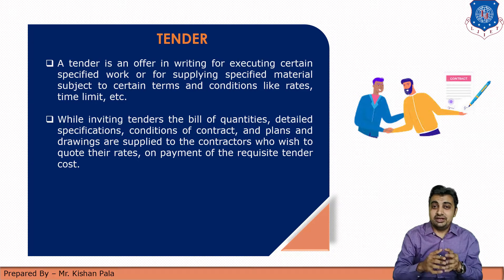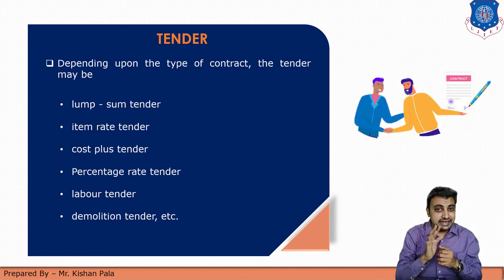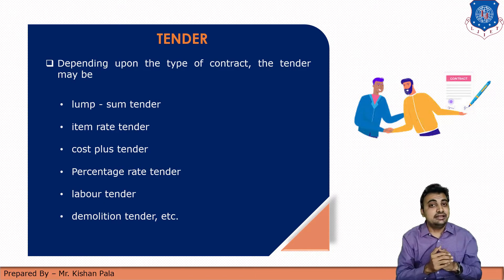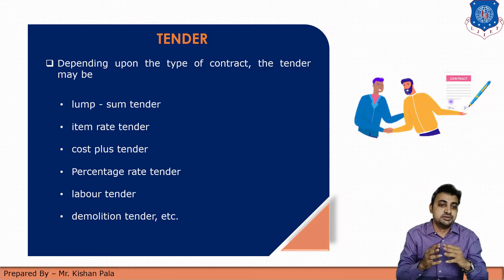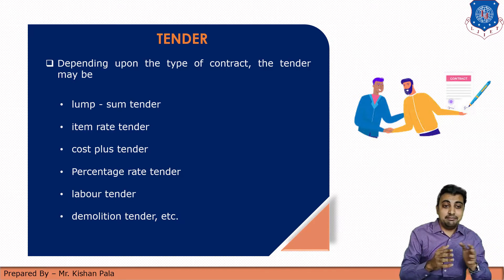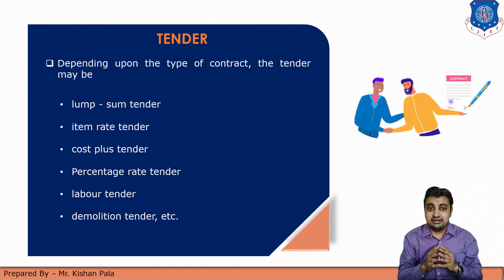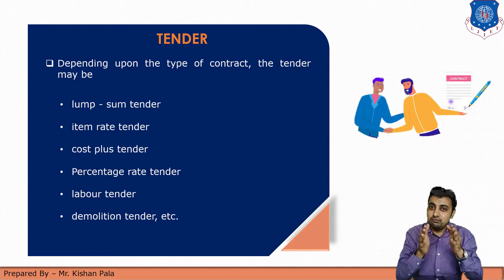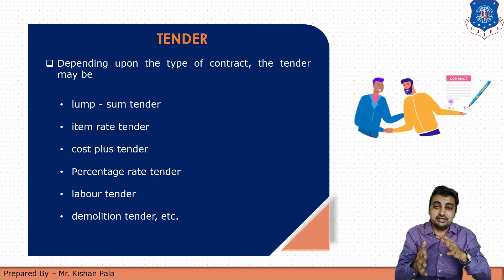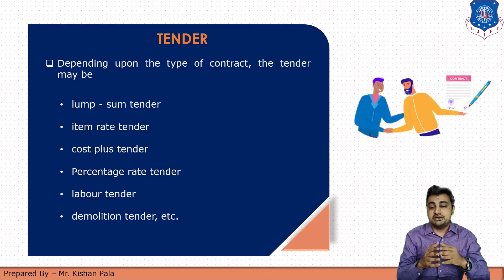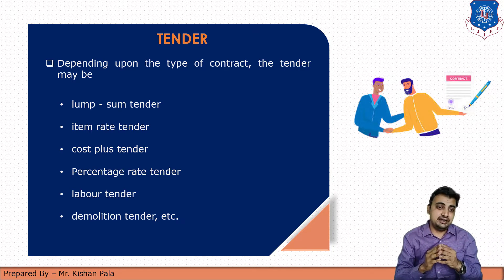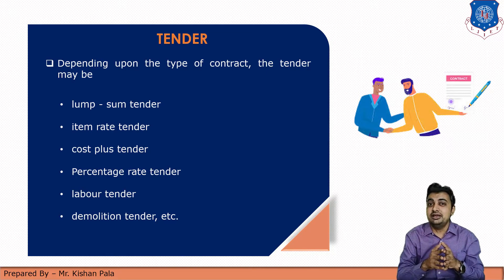If we talk about tender in detail, tender may vary depending upon the type of the work. We already discussed about the types of contract — for example, lump sum contract, item rate contract, cost plus contract, percentage rate contract, labor contract, or any other BOT contract. So depending on the work, the tender can also be done with respect to that contract type: lump sum tender, item rate tender, cost plus tender, percentage rate tender, labor tender, and demolition tender — it all depends upon the type of the work.